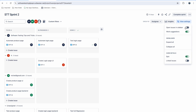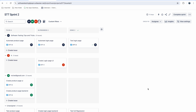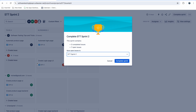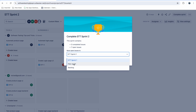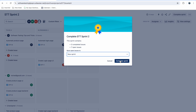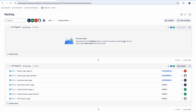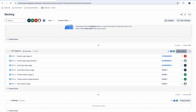From the settings you can control open issues, work suggestions, and expand or collapse all items. Now, if the sprint is complete, you click 'Complete Sprint'. Some issues may not be finished — you can move those to a new sprint or back to the backlog. Most companies move them to the new sprint since they are already running one. Once you confirm, the sprint is completed and you can start the next sprint.